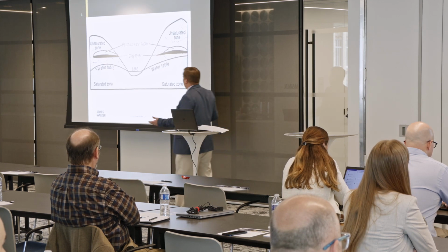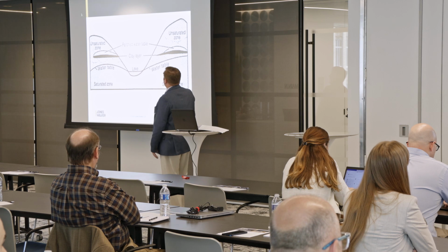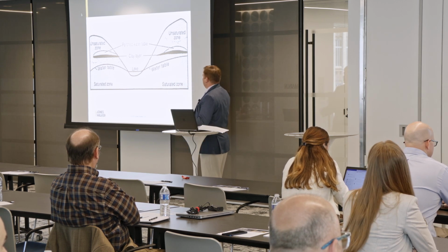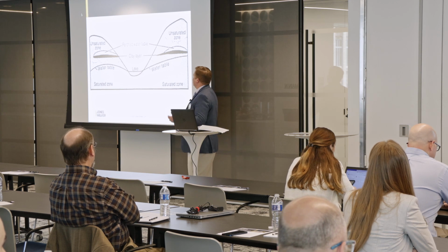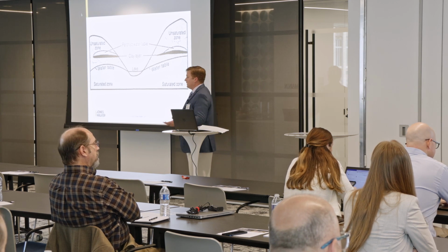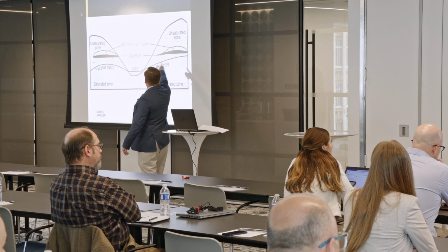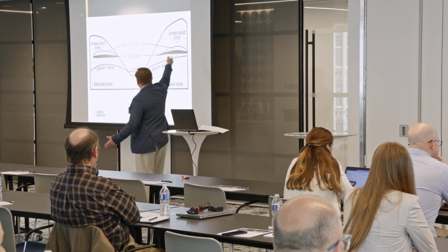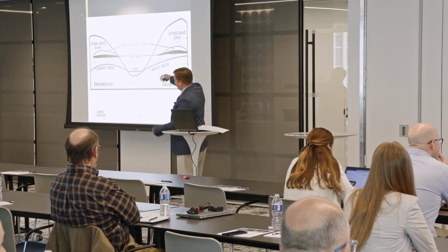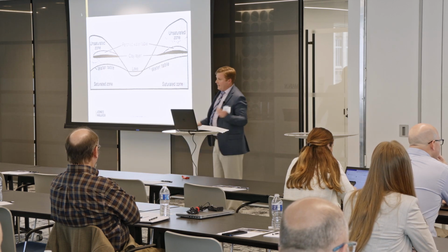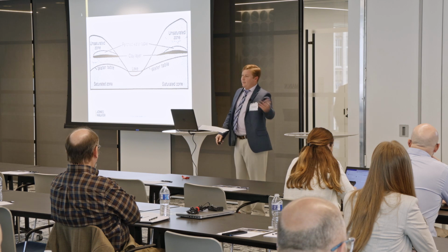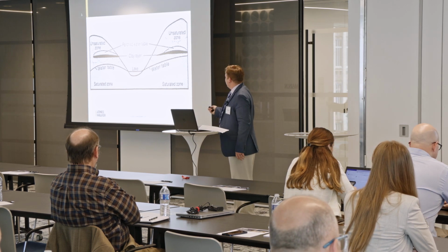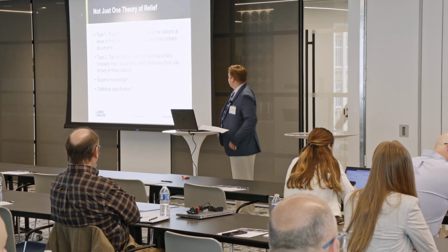One of the large claims in the case was our claim that there was a differing site condition due to continuous clay lenses. If you can see here, these clay layers cause water to perch on top of them, and the water keeps draining into the excavation, and then it rains and it recharges back into the excavation, and makes it tough to get the job done.